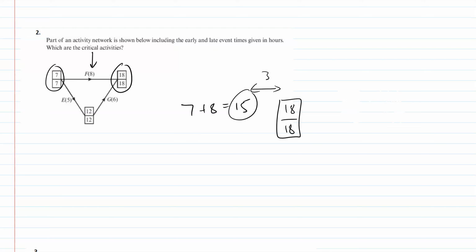We've got a leeway of 3 here. So even if I delayed F by a little bit, or increased F by another 2, say, and it was 10, so let's say F was 10 instead, just for argument's sake, then we'd have 17. It would still be fine because we're still well within reach here. If you made F 14 or something, then obviously it's going to change things.